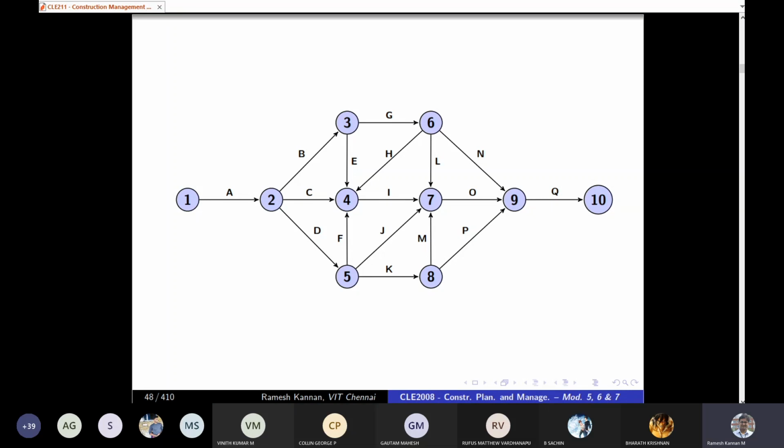Take a real-time project which may have 1,000 activities, which means 1,000 into 2 or approximately 1,500 nodes. Then naming them will be a crucial part, and it is essential. If you reverse them or if you provide poor nomenclature or poor labeling, then it might be a huge disaster when you execute the project. So as simple as that. So that's how people generally have a rule called Fulkerson's rule, developed by the person who devised the numbering of events, right?